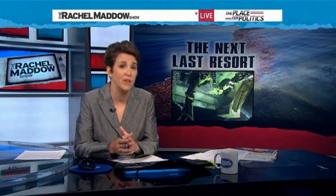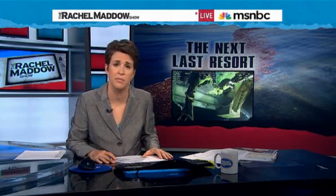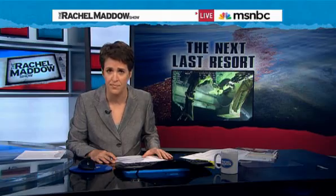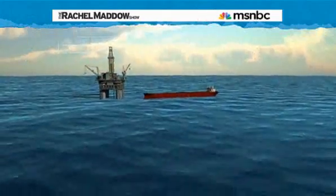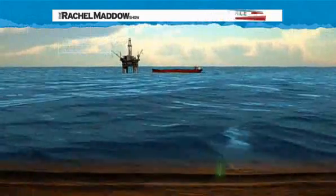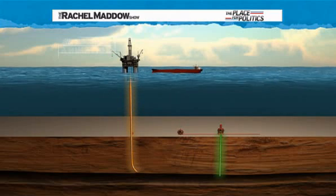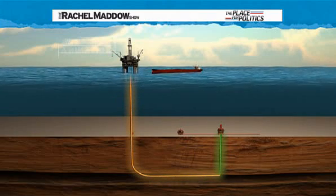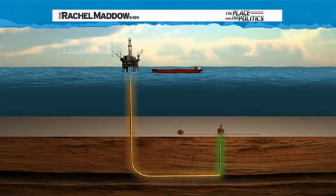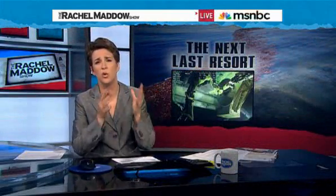From the start, BP and the government have told us that the light at the end of the tunnel, the very last fail-proof rescue, would be these relief wells that BP started drilling in early May. Yes, the wells would take about 3 months to finish. Yes, the process has been described as hitting a dinner plate from 2 miles away. Yes, oil would continue to spill into the Gulf until August. They have to dig deeper than the well itself and then intercept the oil flow beneath the seabed. But at the very least, we know those relief wells will work, right?